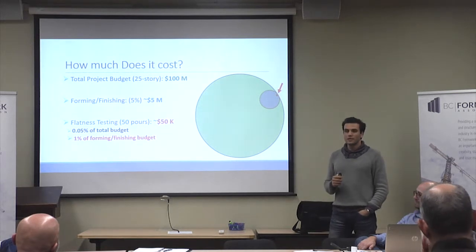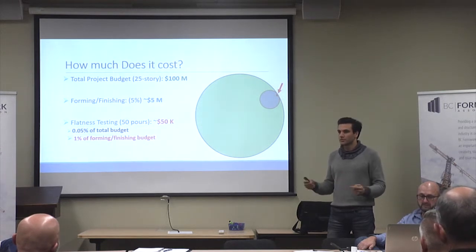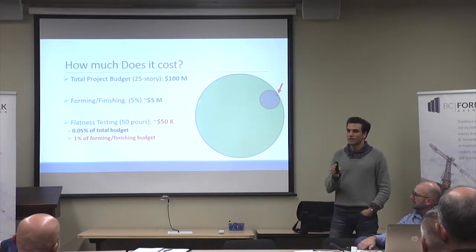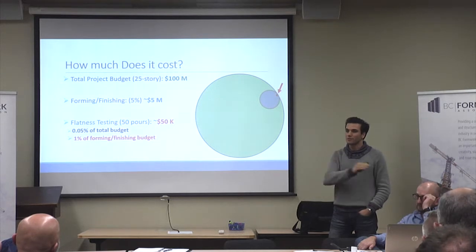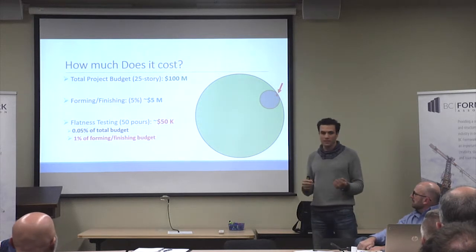The other thing is, that's exactly what you guys were referring to. We are testing the FF/FL as built, within 72 hours, and then we would like to get our hands on the floor, hopefully after the shores are removed and after several months have passed, and see how these numbers have changed.